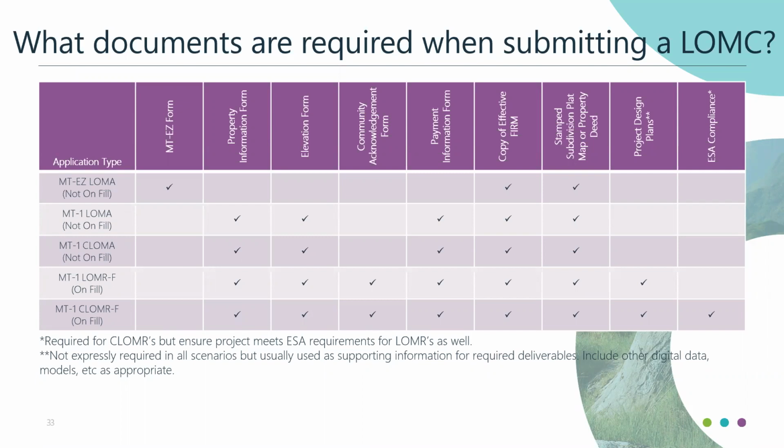Design plans: how are you proposing to do it? Since this is conditional, the idea is the development hasn't been built yet. So what's going to be developed? And then also what's important for a CLOMR, we're going to talk about this more, is the Endangered Species Act compliance part of it. Whenever you submit a CLOMR, that is required.